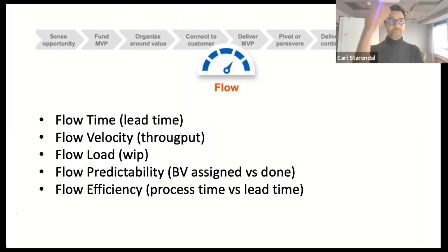So the flow efficiency is a radar that allows you to see queuing problems in the system as a whole. You'll see emerging queues, you'll see emerging wait times, and now you can then balance the flow load in those and say, we can't pull in more into deploy because we already have a queue, so lead time will increase, predictability will go down. Now you have metrics that would allow you to have much more nuanced discussions and better questions. So these 5 would be my go-to.